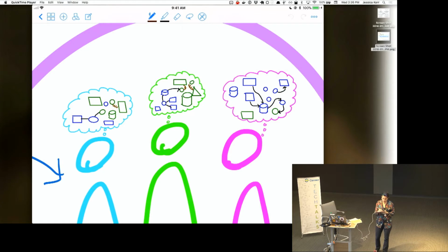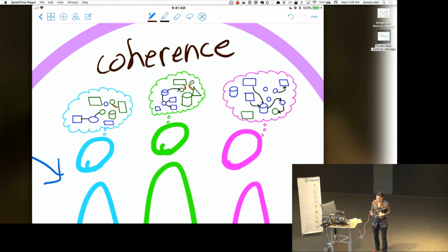And that introduces a coherence penalty as our teams grow larger, because we have to take a lot of time just to coordinate with each other to be sure we're sufficiently in agreement about what the heck is going on in the system to be able to change it in a way that doesn't step on each other's toes, so we can trust what each other does. That means we have a limitation to the size of team that can work together productively.